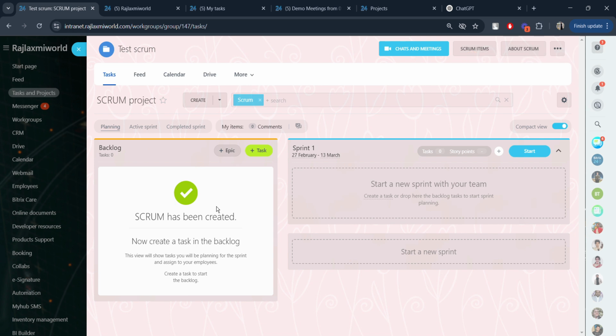The backlog, all planned task idea feedbacks are gathered in a special list. It is called a backlog. It helps the team not to miss something important. Sprints, the tasks are set for a short period of time, usually 2 weeks. These cycles are called sprints. You will get a certain result by the end of the sprint. If a task is not completed during a sprint, it can be divided into smaller subtasks. This format allows you to get a small but predictable result in a certain time period.